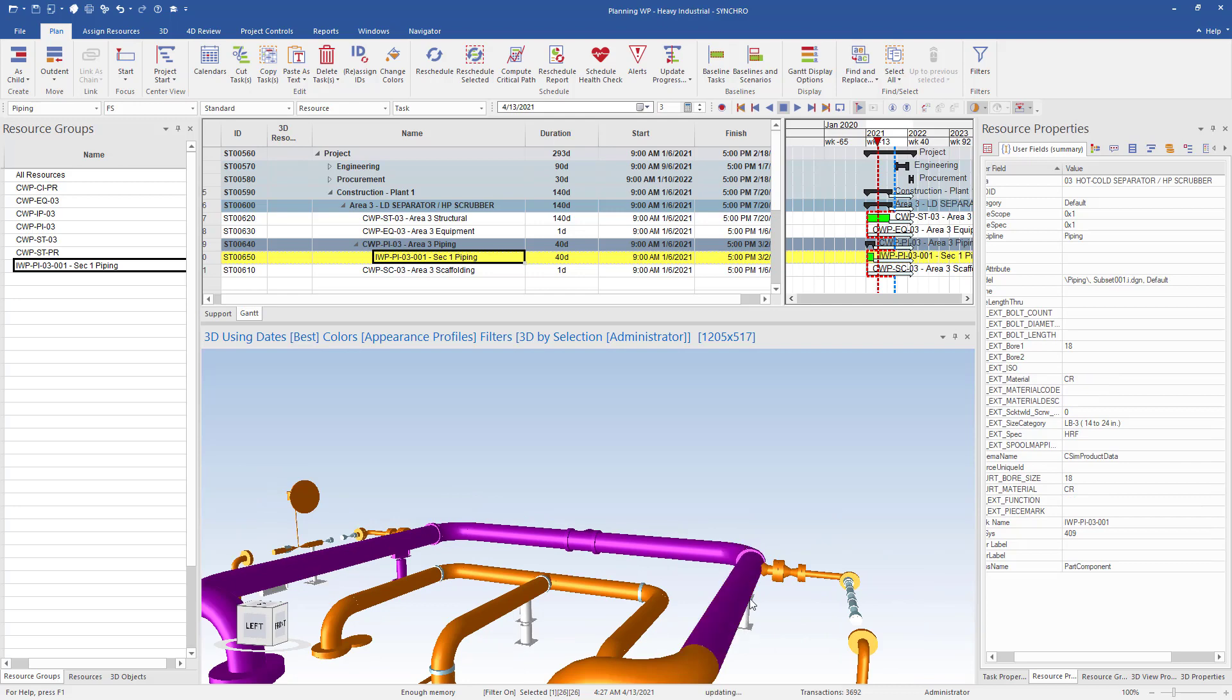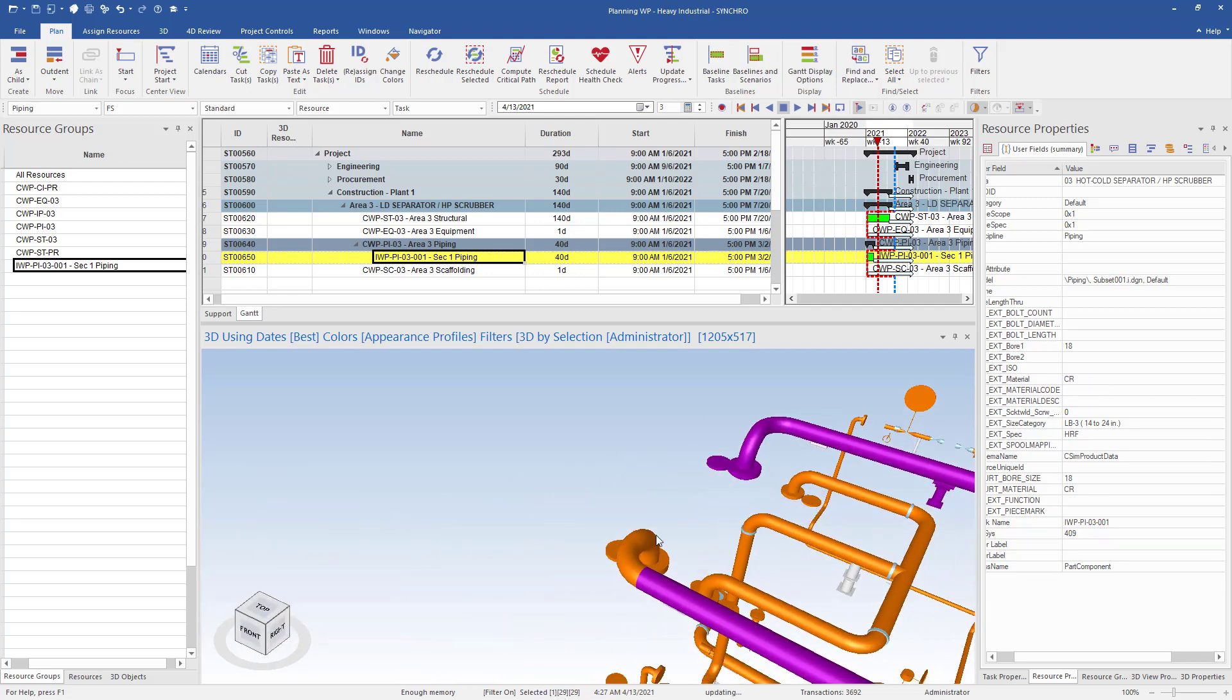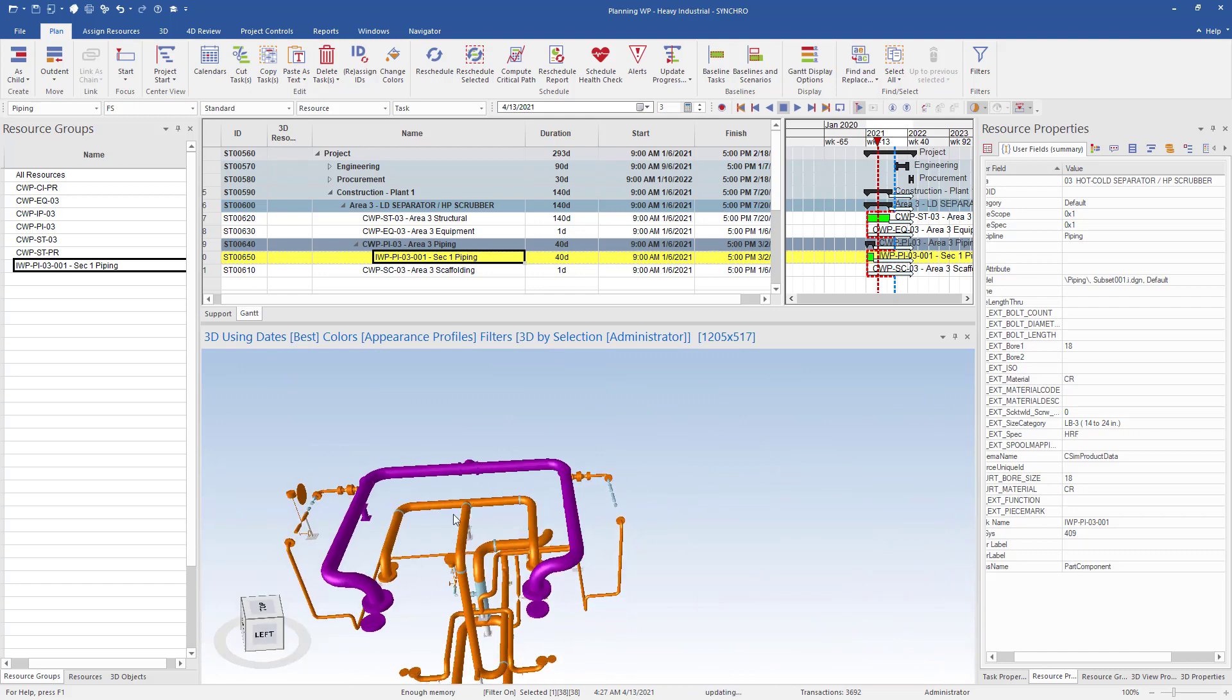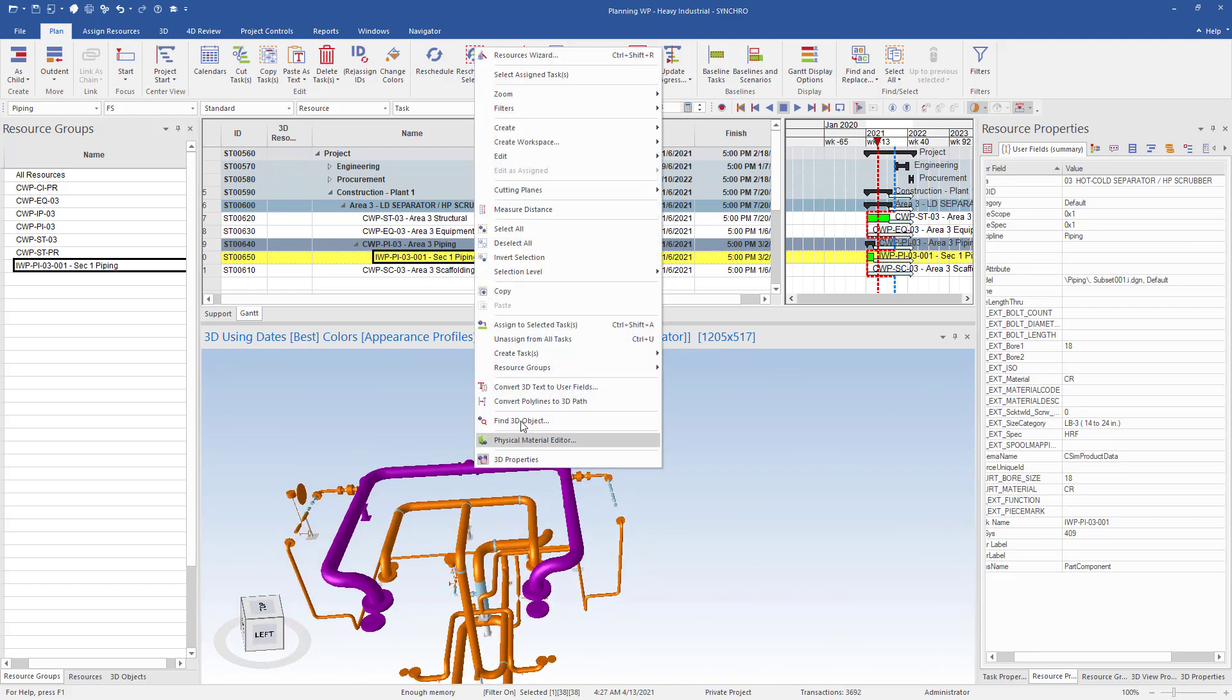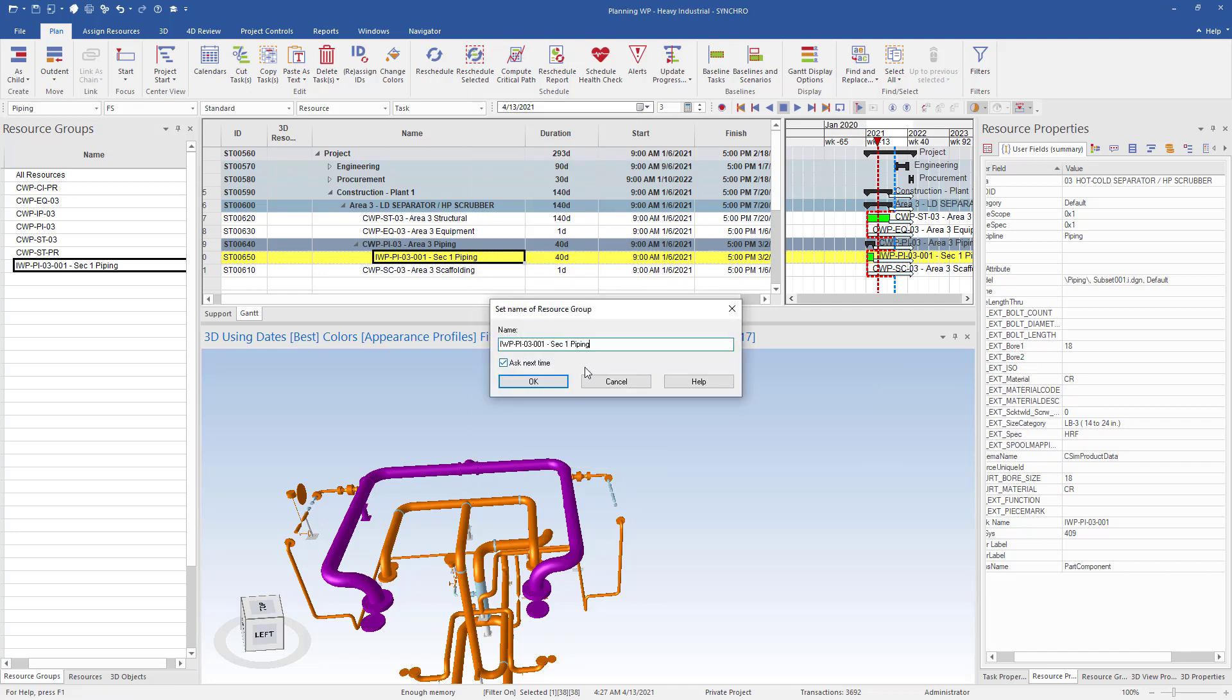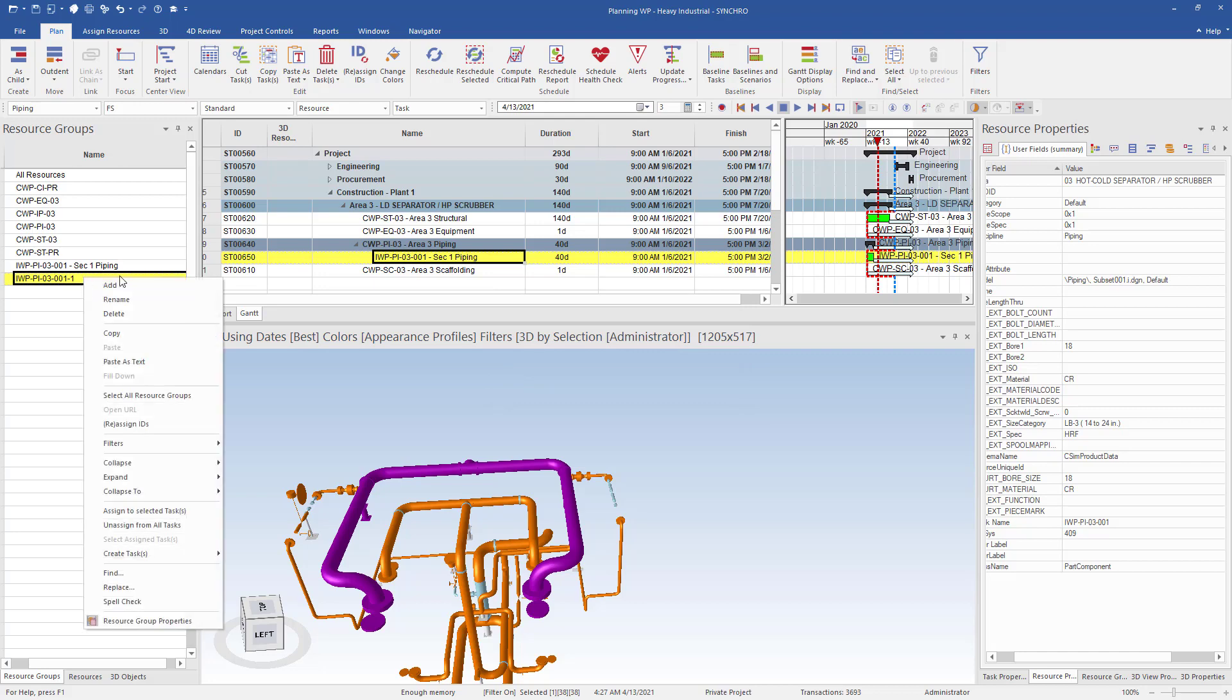If the resource properties supplied from the model software include IWR values in the user field summary tab, we could use that to select all the objects with the same IWR value. But for this example, we will manually select. Once we have all the piping required, we will repeat the previous steps and create new resource groups and tasks for all the piping.